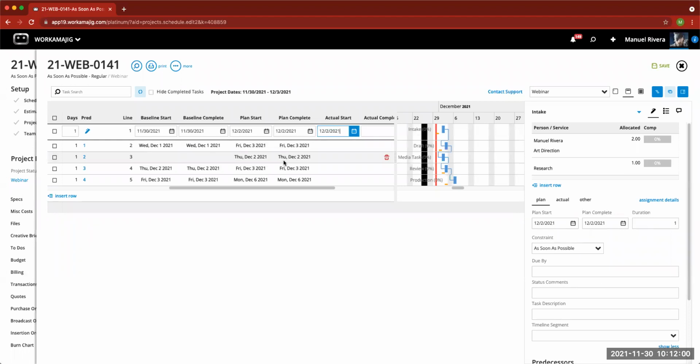But again, remember, the system is still going to look at your computation: those duration lines, those dependency lines, and then the default constraint and the default settings that push those dates according to what you have, but knowing that you can lock one of your milestones down. The usual scenario I describe is you have a photo shoot, and unless it has to move because of scheduling conflicts, you want it to be on a certain day and that locks it down. But it won't really move with those push dates features that we talked about.